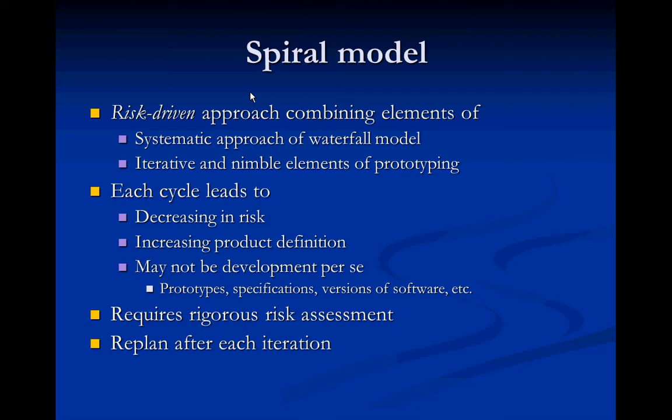trying to resolve it quickly so that you can have more lead time to change things is very advisable. So one of the reasons you might choose a certain incremental delivery strategy would be you want to know about a problem as soon as possible so you can head it off by doing something very different. Rather than assuming you're going to be able to do something later in the stages leading up to it and find you're at a dead end. Knowing about it sooner will give you more flexibility.